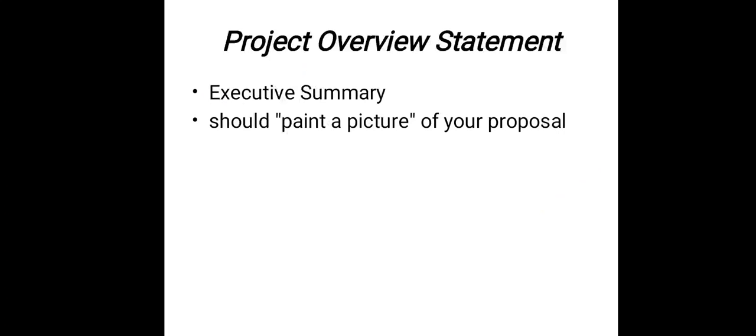The best time to prepare the project overview is after you have completed the entire proposal and you understand all aspects of your proposal very well. Let the overview be your last piece of writing and then insert it at the beginning of your proposal. Try to keep in mind that someone will be reviewing your proposal and you would like to have this person be very positive about what you have written. The project overview will probably form a strong impression in the mind of the reviewer.